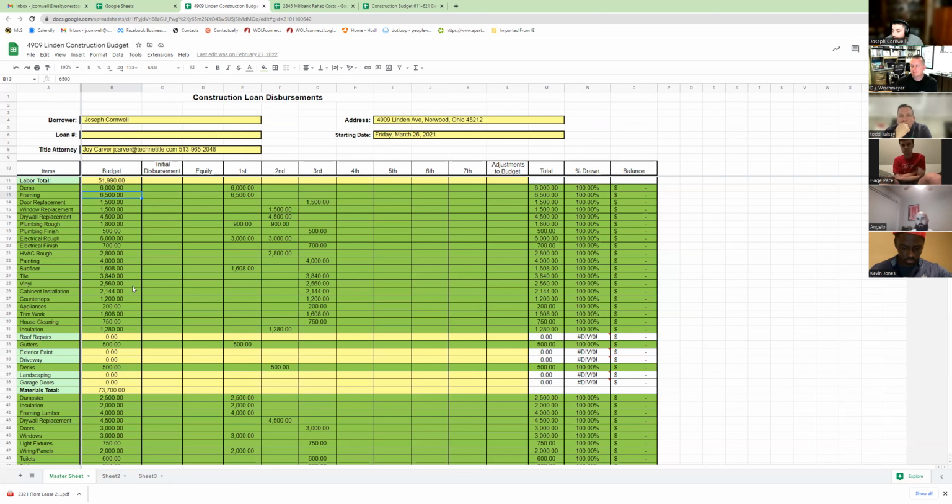Once you get the window in level and plumb, doing all the stuff to fix it on a replacement window is actually more work than the window. So fixing drywall, trimming the outside of it, those things are actually more time consuming than the window itself. But anyway, I just wanted to give that example as a way you can break down cost by the number. Doors are another one.